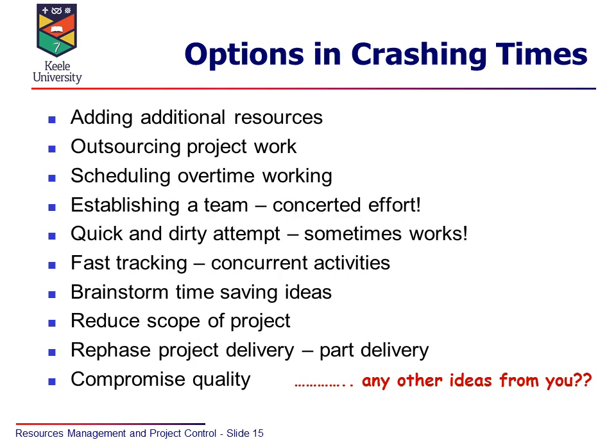Okay, so we've talked about crashing times. What do people do when they crash times? I just listed on this slide some of the things that people do. They might outsource some of the activity, they might add additional resources and people, they might try and fast track, they might try and reduce the scope of the project. So all these other things that people do just to, I won't say make shortcuts, but actually try and save some time for an activity.